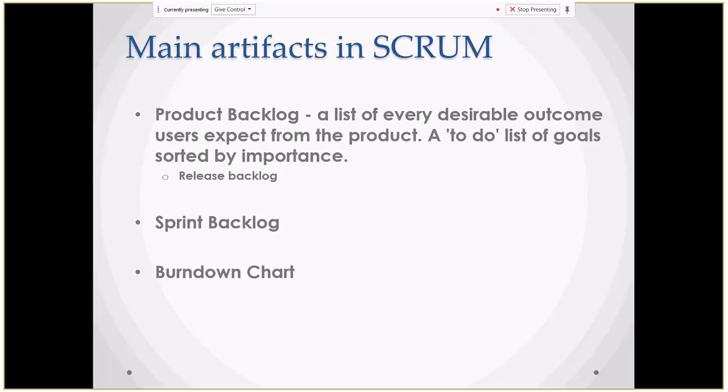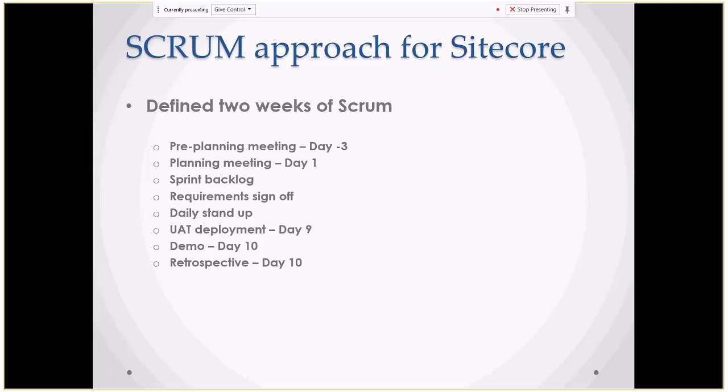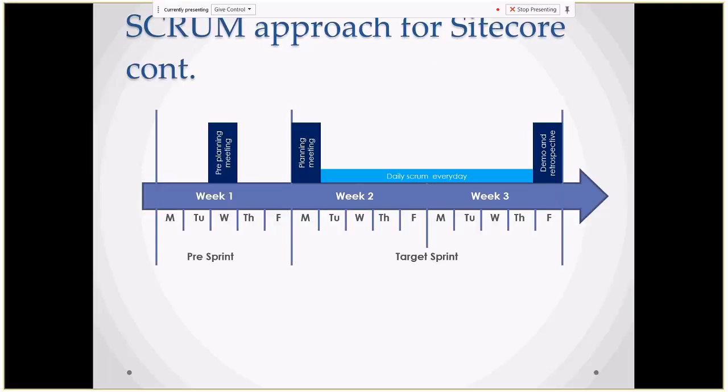They are explaining about the 3 days for the pre-planning. And the planning meeting is one day. In the planning meeting, the team will be proposing their estimates, the technical team also. In the pre-planning, the product owner, the Scrum Master and the QA representative will be there. So they have a good idea about the user stories and everything. But when it comes to the pre-planning stage, the technical team doesn't have some idea about the planning stories.